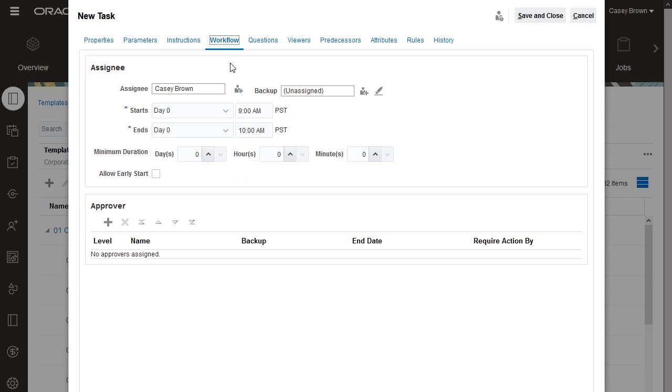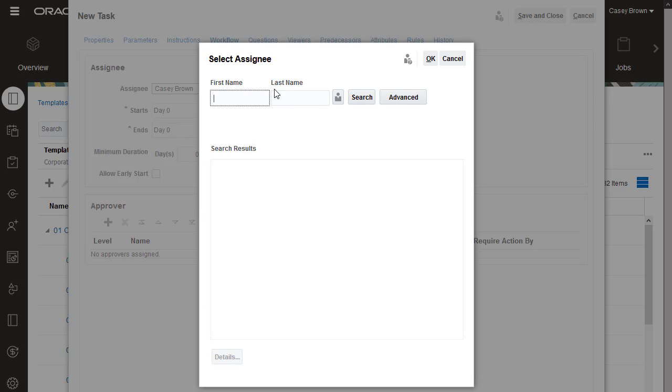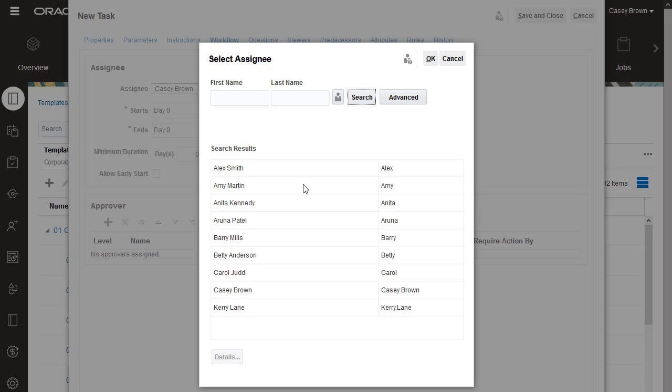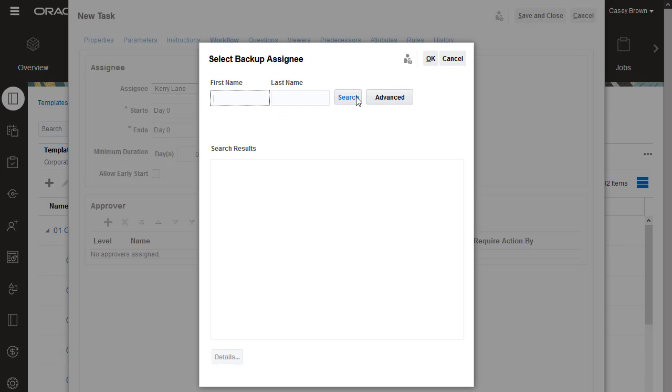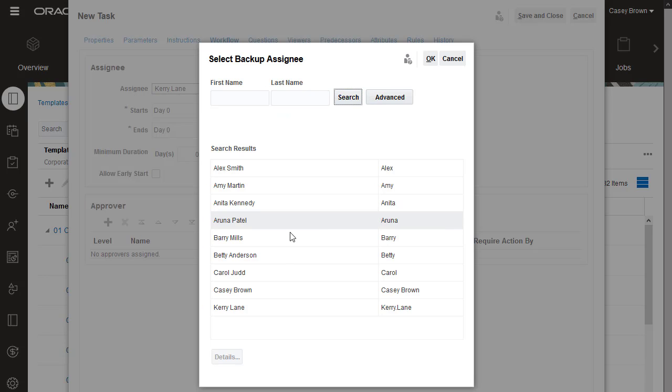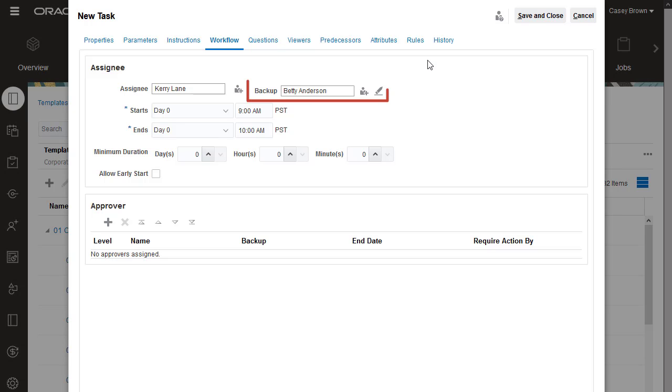On the Workflow tab, you assign a user or group as the task assignee. If you select a group, any member of the group can claim the task to start working on it. You can optionally assign a backup user. The backup user automatically becomes the assignee if the assignee's status changes to unavailable, for example, if the assignee is out of the office.